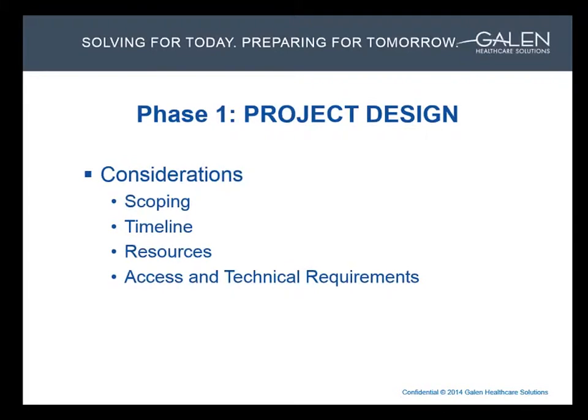The client has a conversion team as described, but they will also bring other resources in during the conversion that they will have to make plans for. For example, the last round of testing uses people that will be actually using the target system after the conversion. The availability for these testers needs to be planned for at the beginning of the project.